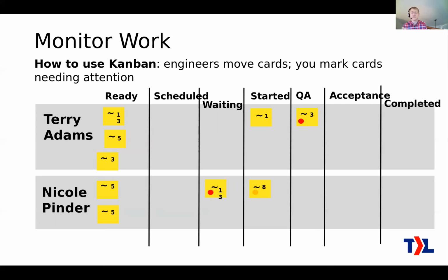They want their tickets 100% done, because they get all the value of the ticket at the moment that it is 100% done. So this is how you do that: by pulling the work that's already closest to being done, so that it's all the way done, or at least moving it one stage further.